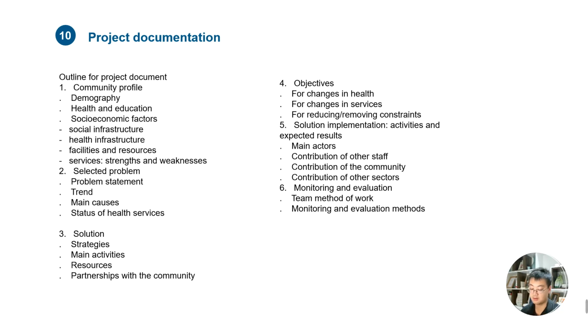Include a Gantt chart for all activities, and a brief summary of the tracking and monitoring process. Prepare project documents according to the outline. The presentation should explain the steps followed during the workshop.